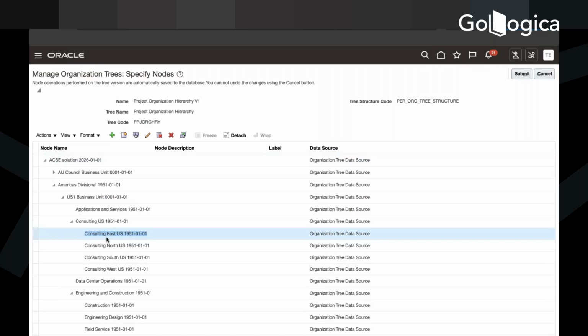Okay, hold on. Let's understand one more time. I thought you used to explain it. Burdening calculates based on the BU and expenditure organization, which is nothing but a department. So under that department, however many employees are there, say I have 5 employees costing 50,000, then that 50,000 is your raw cost times your fringe times overhead. That's the way it's calculated.